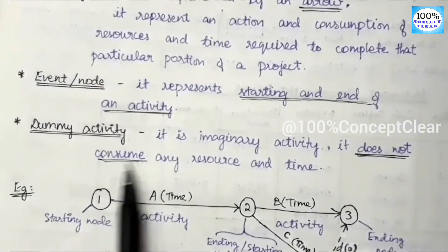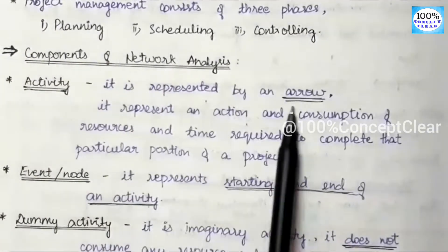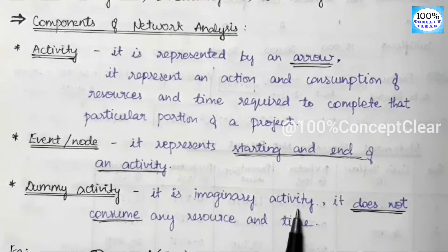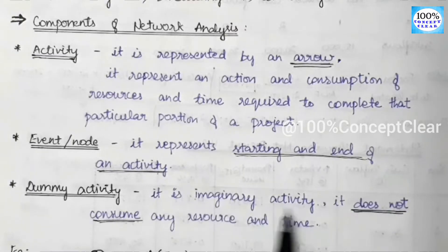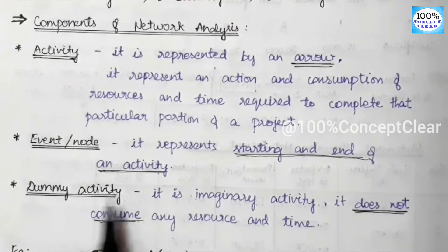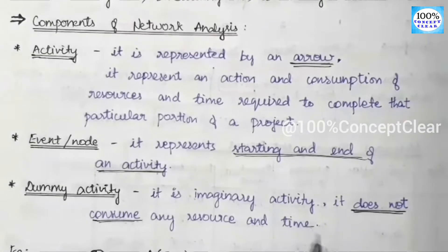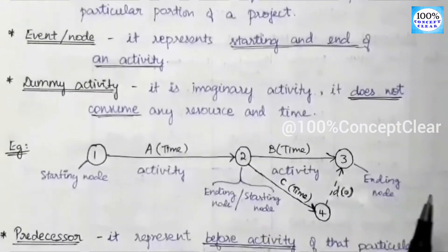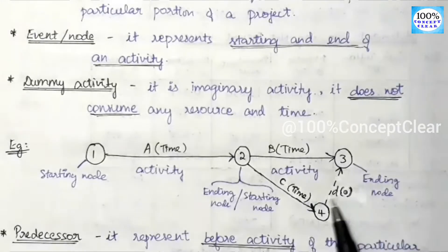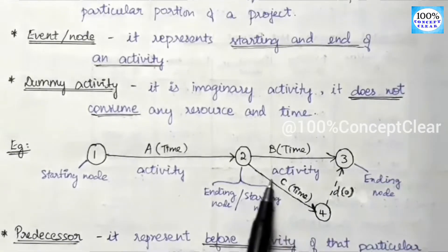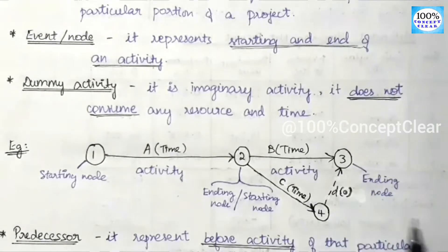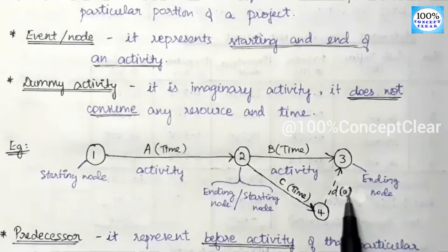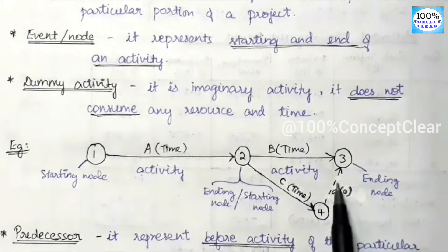The next component is dummy activity. A dummy activity is an imaginary activity — it does not consume any resource or time. For dummy activity, the duration is zero, represented by a small 'd'. In the network diagram, a normal activity uses a normal arrow mark, while a dummy activity uses a dotted arrow mark.